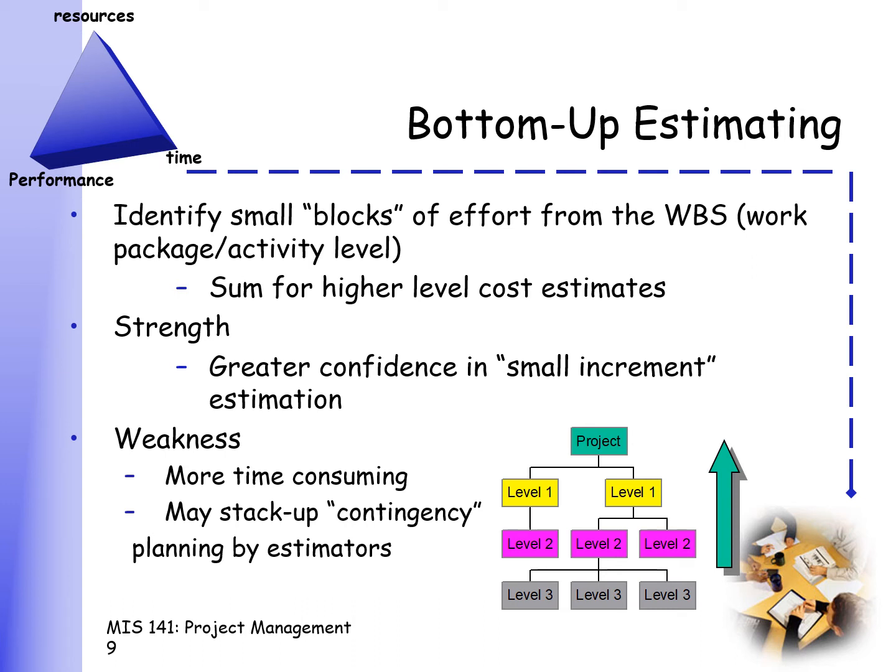And for every activity, you start adding it up until the highest level of phase. So imagine again your work breakdown structure. Go to the granular activities. Try to identify how long each and every one of those activities take, and then add them up. Continuously start adding them up, going up and up and up until you already have the total of the whole project.